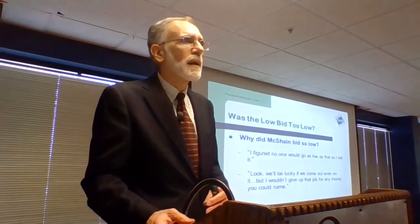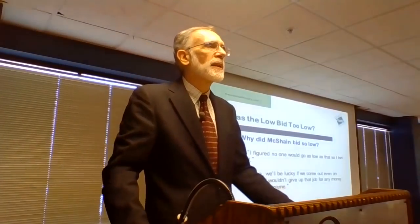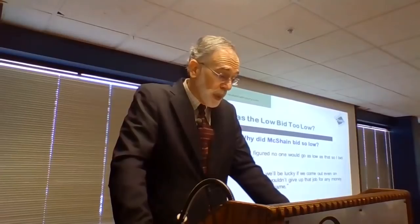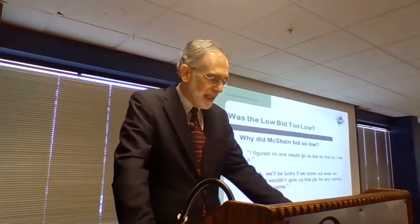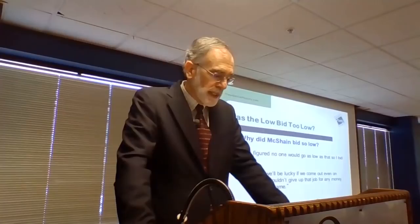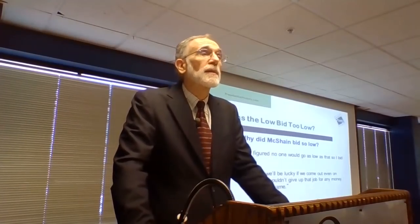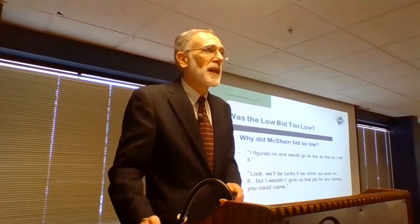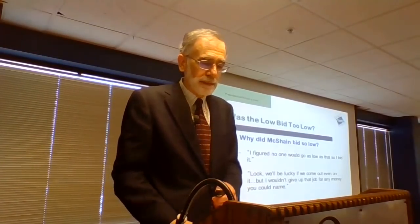But why did he bid so low? I mean, the high bid is close to $1 million. He bids $100,000. He said, well, I figured no one would go as low as that, so I bid it. Well, he got the job. And he also said that, look, we'll be lucky if we come out even on it, but I wouldn't give up that job for any money you could name. So he wanted to add to his credentials the fact that his company had rebuilt the White House.